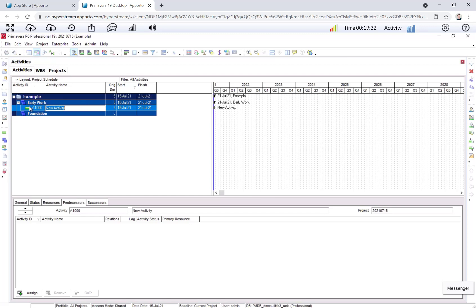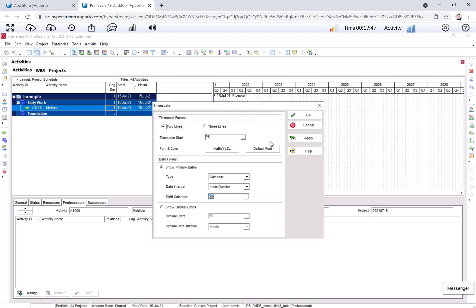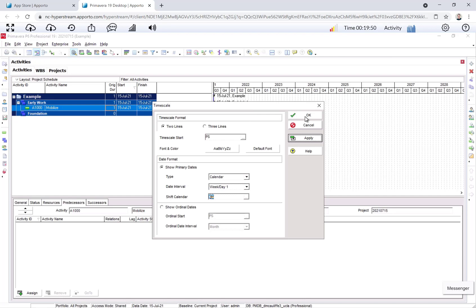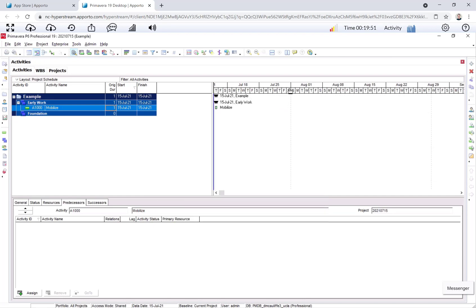Okay, the activity is now here. I don't adjust the activity ID just like I didn't for the WBS elements. But I will change the name to Mobilize. I will tab over to the original duration and say one. Let me change this time scale so that you can see more.